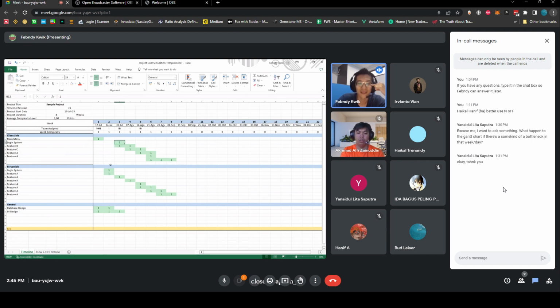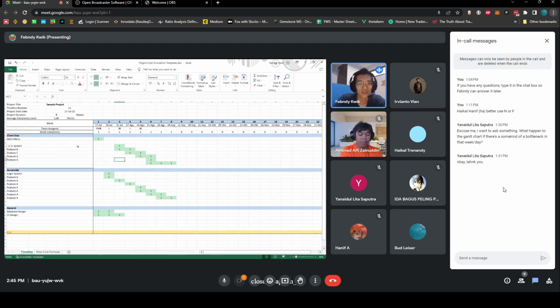Sometimes you can do things in parallel and then connect later afterwards. In that case, you can do parallels like this. Like the main menu goes first, but the login system you're going to delay for a bit. Perhaps this is the situation we have: you finish the main menu, the login system you can't do yet because you're waiting for something else. But then you can make the settings perhaps, because you don't actually need the servers for that. So this goes to this, and goes to this. This is done after this. So that's also part of the planning to prevent delays.